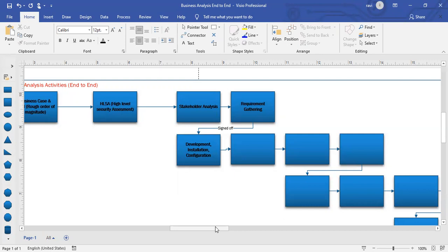Sometimes business users may tell hundreds of problems. But when we interrogate them and elicit requirements from them, there may not be any problem at all, or there could be one or two genuine problems. So even if they give us the requirement, we should consider it a draft requirement. We should go back and ask all possible questions so that we don't have changes to the requirement at a later stage, we don't have scope creep, and we are not developing anything which is not usable.